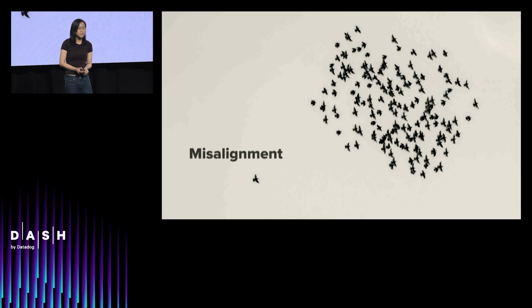What had happened? With sufficient time, with sufficient resources, all of the problems I shared could have been solved. But really, we hadn't approached the project the right way. We'd gone for a bottoms-up approach, and we should have got everybody on board in the first place. As a result, we didn't have a strong case for why Airbnb had to make this transition to services at this point in time. And we remained in the monolith.